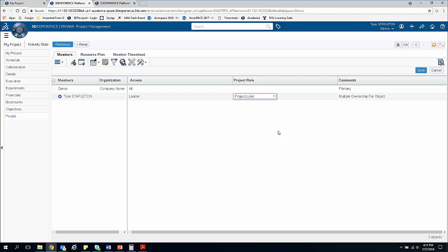It also gives me the ability to keep tasks assigned to individual positions on the team, even if those positions are more fluid and are going to be filled by different people throughout the course of my project. So on a project that takes several years, where individuals might be assigned as a project lead or a design engineer partway through the project, and then taken off later and replaced by others, I can move the project role and automatically reassign all of those tasks to the new person. This is an incredibly useful aspect of this page.